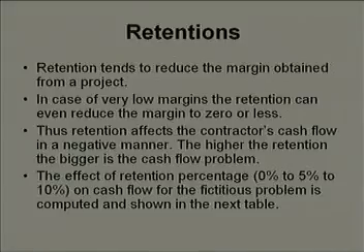So, as you can notice in this particular slide, it says that retention tends to reduce the margin obtained from a project. How? Because the longer your own money is with the client, you are deprived of the opportunity to invest it somewhere else, in some investment option which is going to give you money. So, as a contractor you try to reduce the retention money, that is one thing, and then try to get the retention money released as quickly as possible.